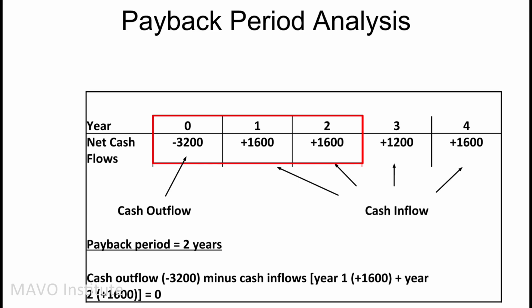So let's clarify the difference between break-even point and payback period. Payback period indicates how much time it requires for an investment to become profitable. Break-even point indicates how much revenue or units an investment has to produce to become profitable.